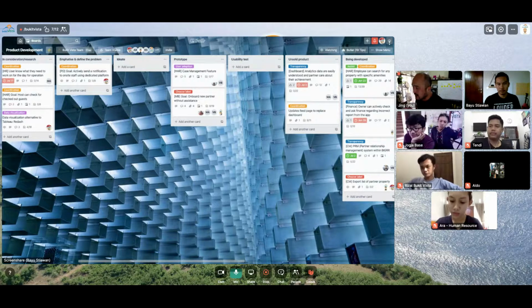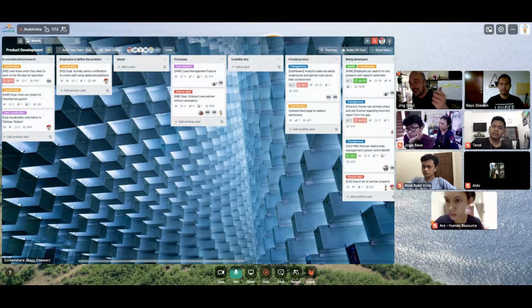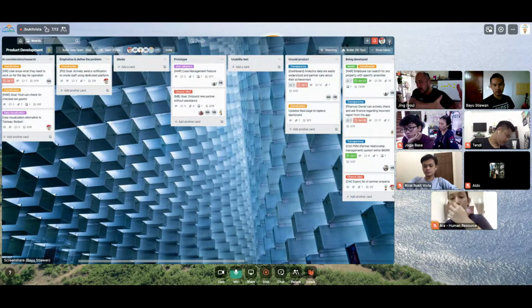we've seen so far is all about prioritization, right? It's about where we are going to spend our resources to do things. What happens a lot of times is that we're so anxious to do things, we just do it. And that creates what I've noticed is the sunk cost fallacy. Does anybody know this term, sunk cost fallacy? Okay. The sunk cost fallacy is if you've already spent 2 weeks on it, you might as well spend another 2 weeks on it. So you just keep chasing your original idea because you've already committed this much time, so you might as well commit more time, and that is how I see a lot of projects fail.